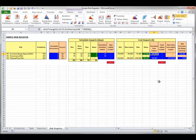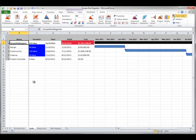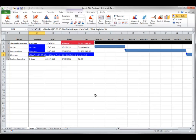Once you have built a risk register, you need to link it to your project schedule. The simplest method is to add a simulated schedule or cost impact directly in a formula in Excel — this method is used for the Environmental Risk in Row 6. During a simulation, this formula calculates the duration of the cleanup task by summing a PERT distribution generating a base of 25 to 35 days, plus the impact of the Environmental Risk from the register, but only if this risk occurs.